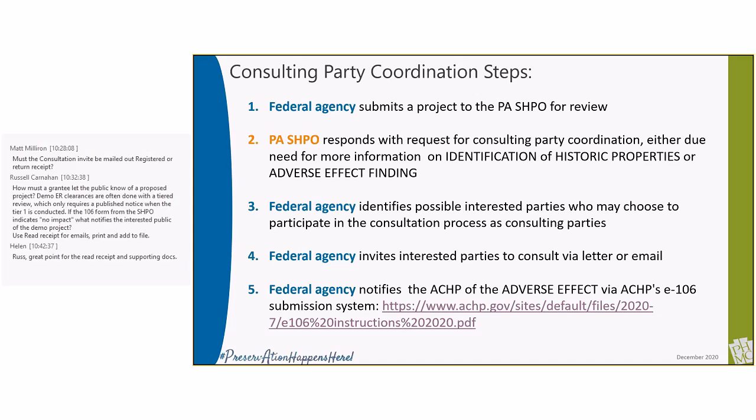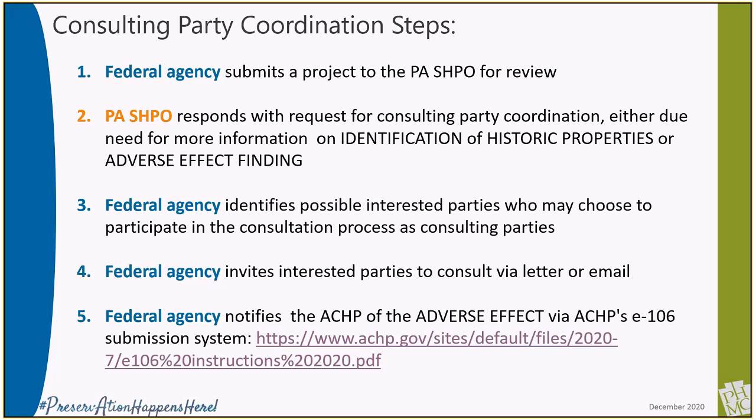In theory, as we mentioned about how the consultation process can occur at any point in the process, you could choose to notify neighbors or organizations routinely of demolitions as part of your effort to seek consultation, but the SHPO will only require that you provide documentation of your efforts to identify consulting parties when there is an anticipated adverse effect on a historic property. I hope that satisfies that request.